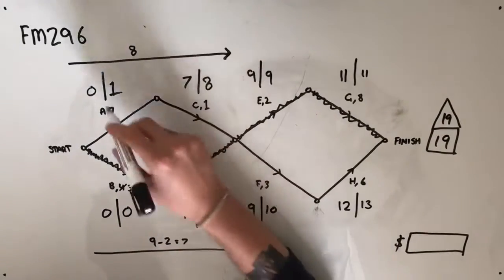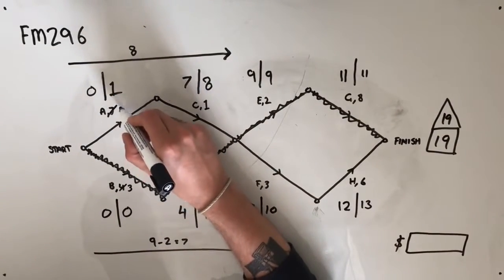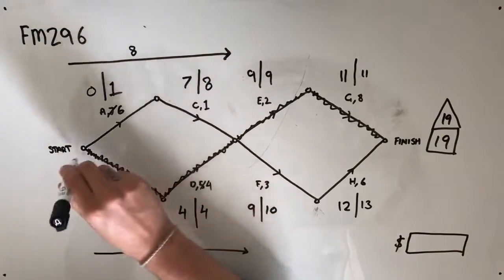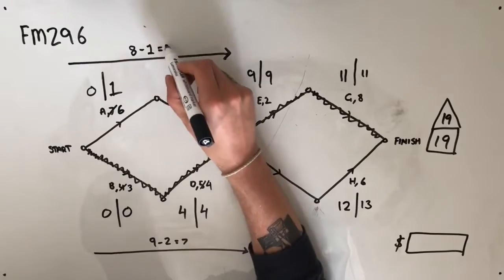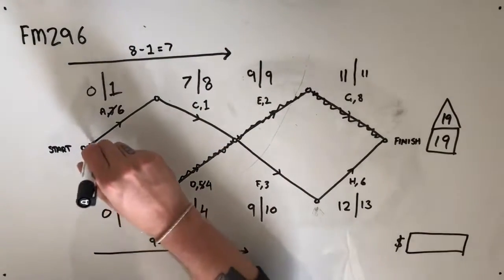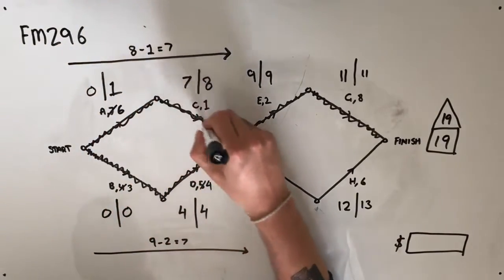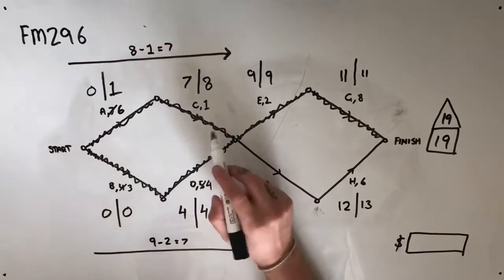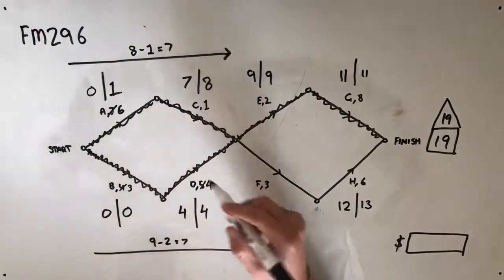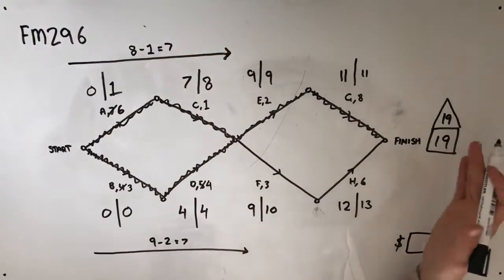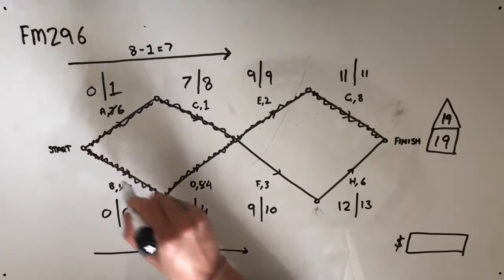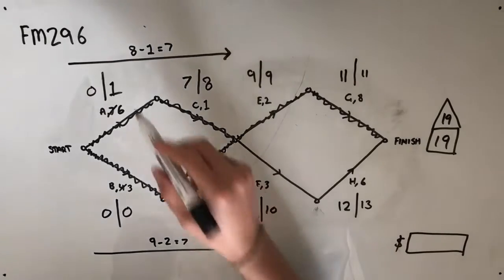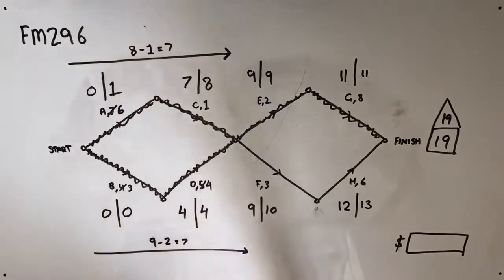However, we don't need to reduce them both, because if we were to reduce A by 1 day down to 6, this path is now going to take 7 days also, which means that they share the critical path. Spending an extra $50 to reduce C, also to reduce this down to 6, won't actually have an overall effect on our project, because it'll still take 7 days to travel along B, then D. So far we've used 3 1-hour reductions.